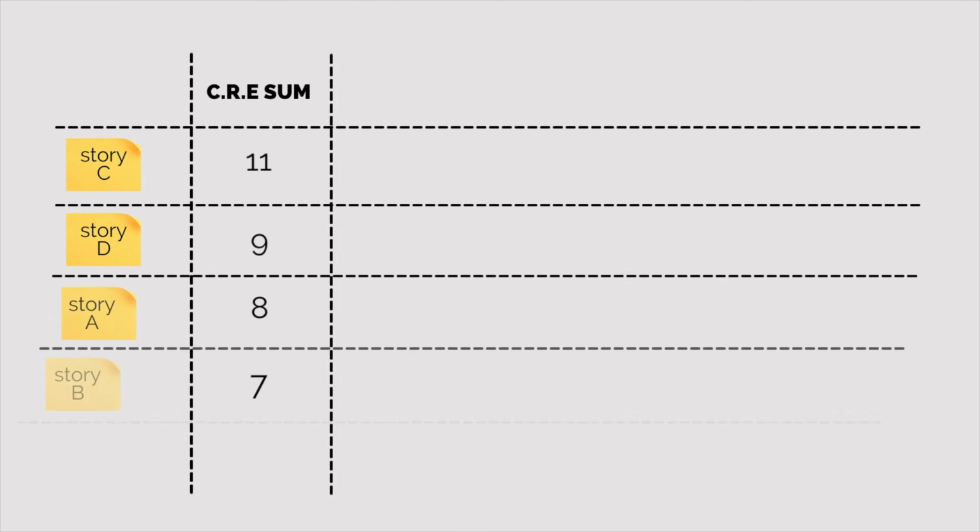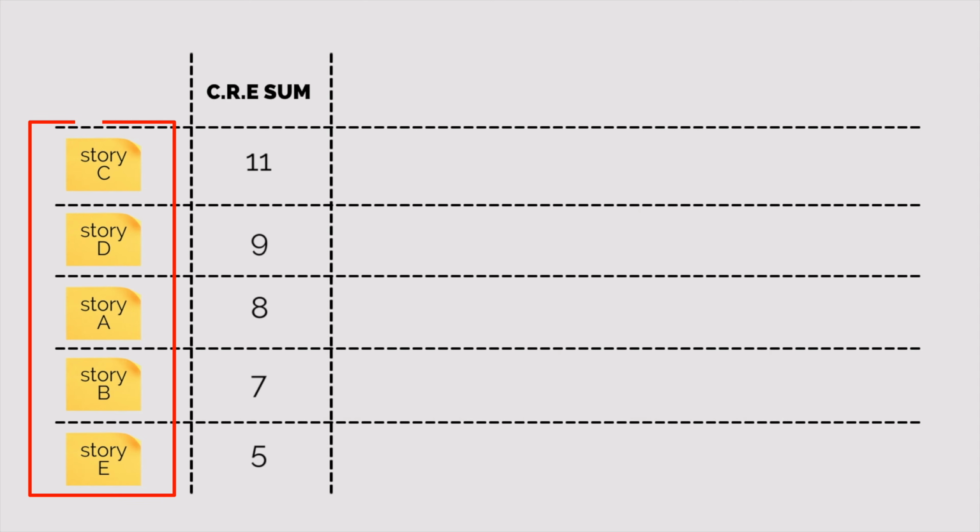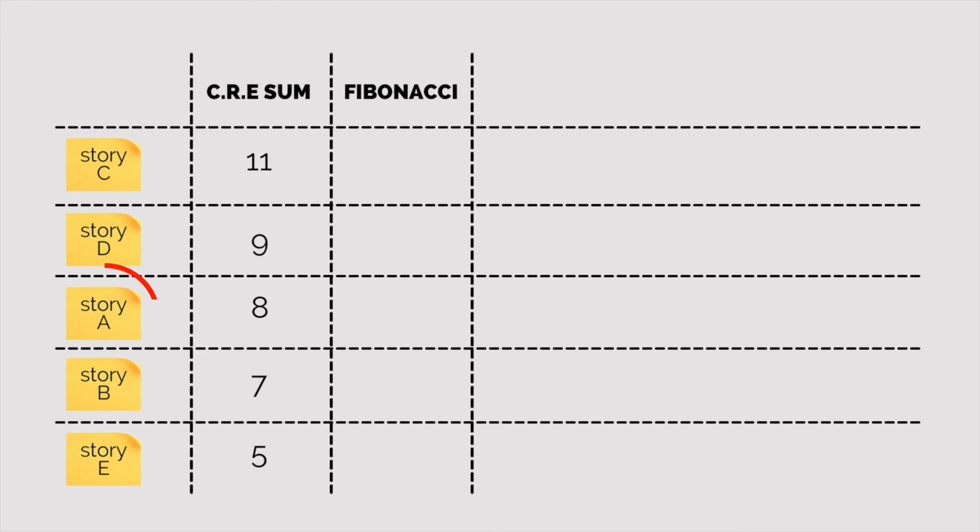The next step in creating the reference stories is to look at the ranked stories in the reference table and assign them a story point using the Fibonacci scale. To start, we can either pick a middle story for the team and assign it a 5 on the Fibonacci scale, or we can ask the team to self-organize and pick a middle story themselves. However, in my experience, I have found that picking a story for the team and giving them a head start, especially when the team is new, is much easier, quicker, and less stressful.